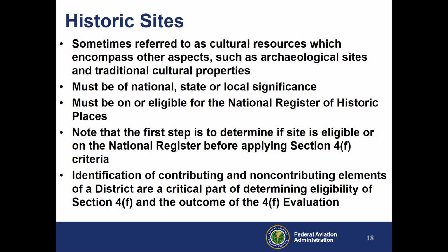But they must be national, state, or local significant. And they must be on or eligible for the register. And note that the first step is to determine whether or not it's eligible on the register before even applying the 4F criteria. And we also have to go through the identification of any contributing and non-contributing elements of a historic district when determining eligibility of 4F and how we prepare that 4F evaluation.